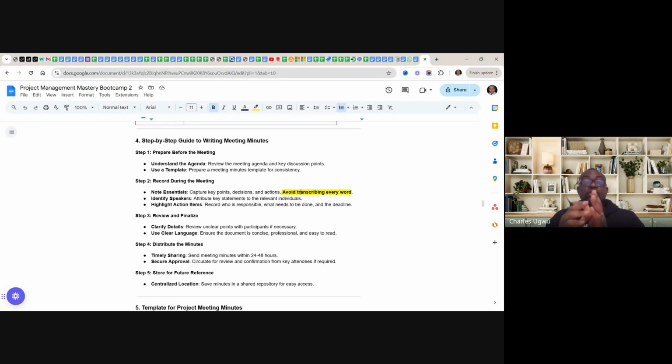So you must identify key speakers and attribute key statements to the relevant individuals. Highlight action items, record who is responsible, what needs to be done, and the deadlines. That is important. You must record all those things.